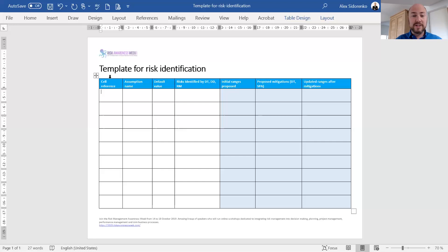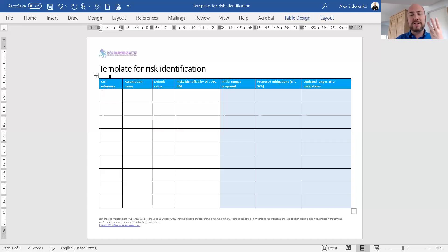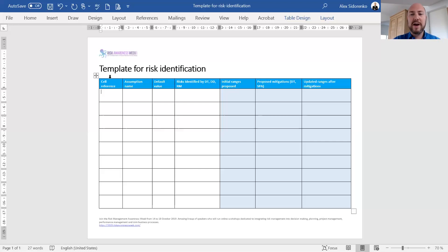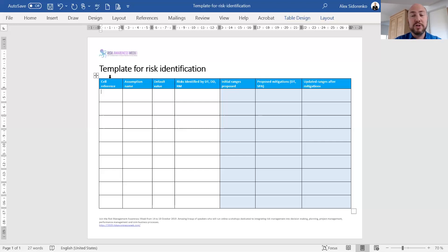This is groundbreaking stuff. We haven't even mentioned the word risk yet. Before you even begin to think about risks, you first have to understand the decision, break it down, and drill down to each assumption. Then you list out all the assumptions. The first column is about listing out all the assumptions that are significant for a particular decision. This is actually much more difficult than it seems. You may potentially need to run a quick sensitivity analysis to determine which assumptions do or do not impact the decision.